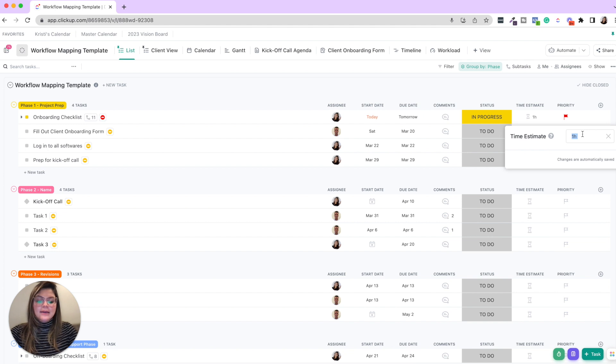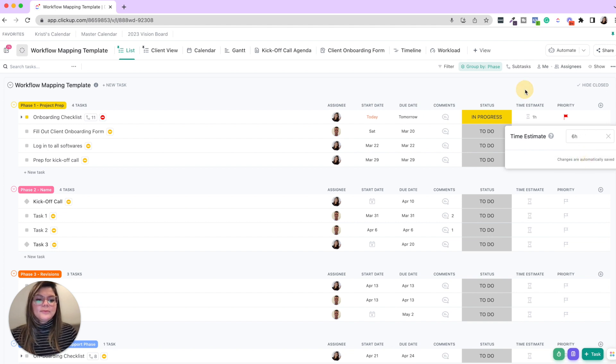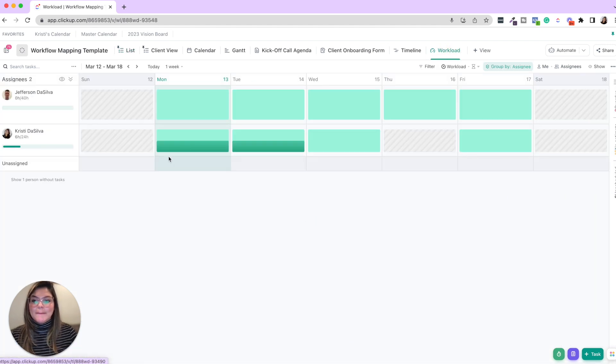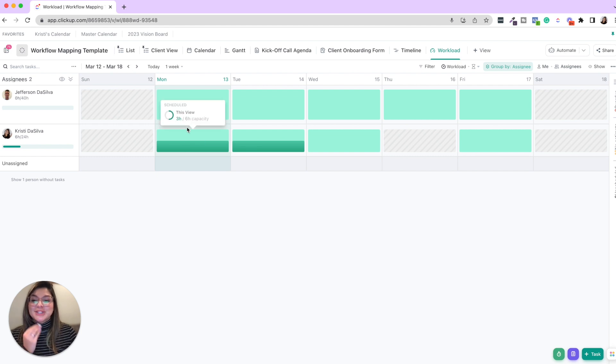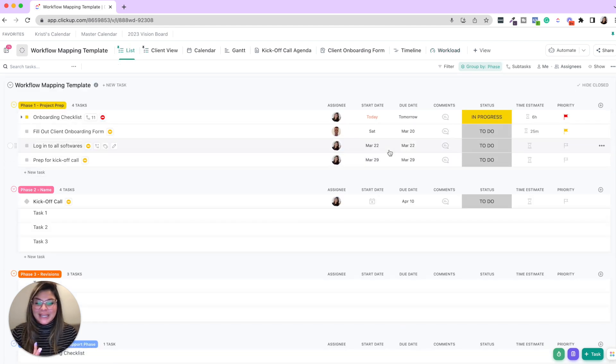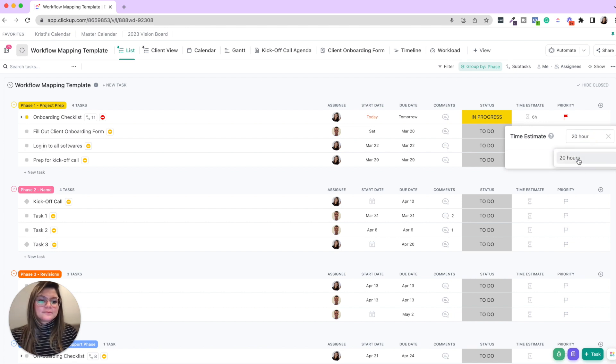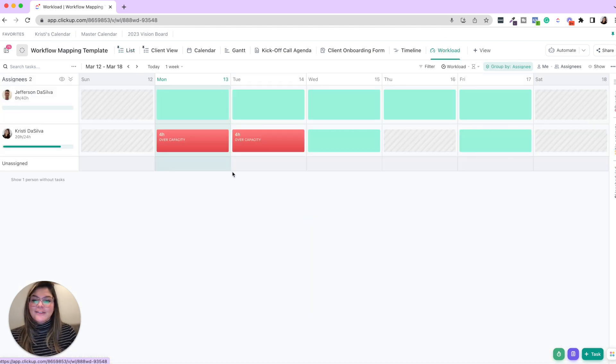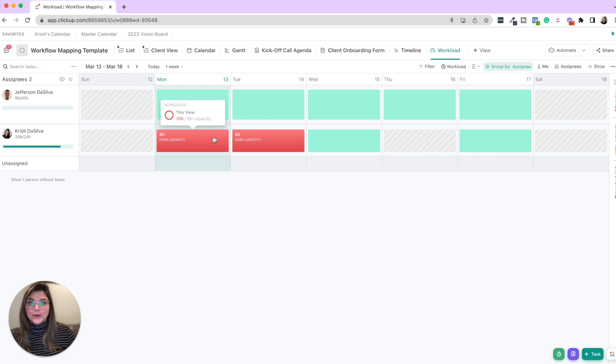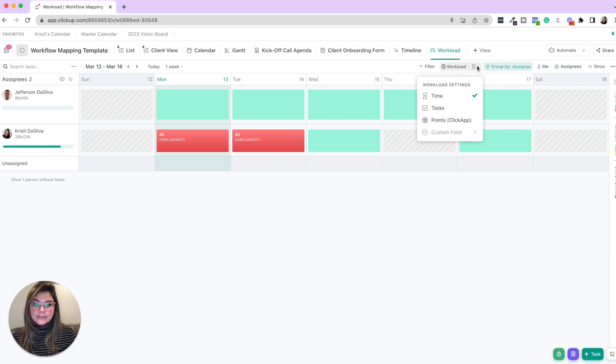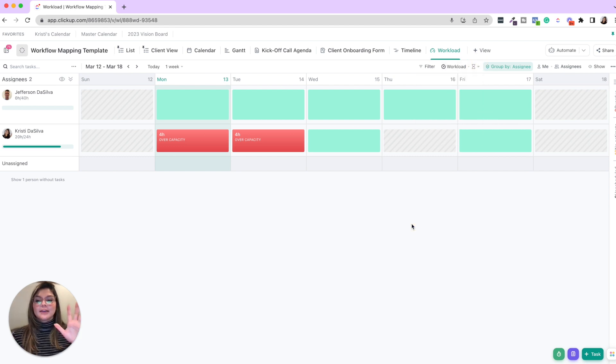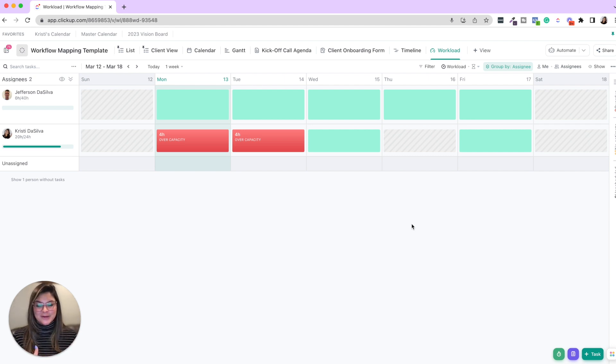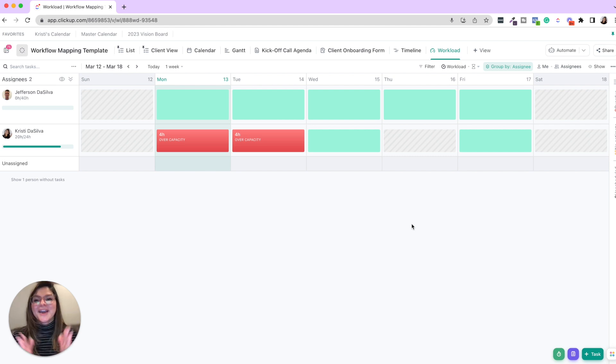Christy works 24 hours. She's just part time. Jefferson works 40 hours. And you can go from there and then I'll show you if you go ahead and you have X amount of tasks that equal over their capacity. Then when I go back to workload, it's going to become red. Then you're going to see Christy is four hours over capacity. So whether you want to use this with task load, with time estimates, you can even use sprint points. Then you will be able to truly see an accurate representation of capacity of each of your team members. It is an incredible tool. So that is workload.